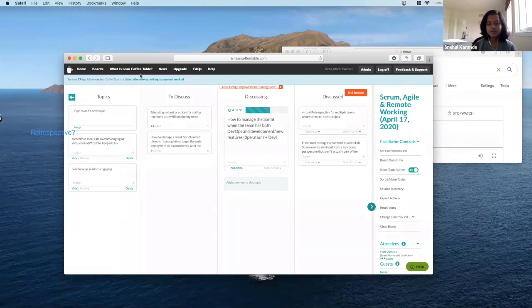That's one technique we used. It's also the product owner's responsibility to decide whether production issues need to be fixed right away or can be deferred to the next sprint. So we worked with the product owner to set up some story points just for the production issues in the planning session itself.